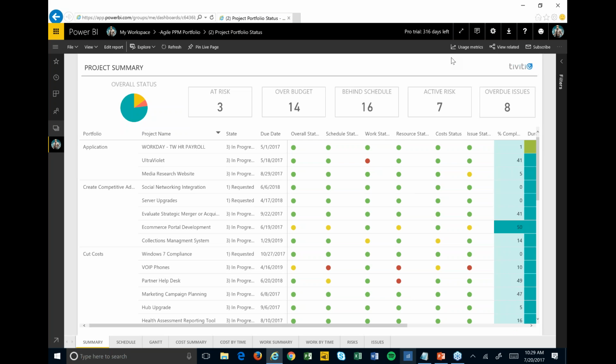They call them data alerts. So I could put an alert if any of these projects goes overall status turns red. I want to be alerted, so I don't have to come in here and necessarily even check every day what's going on. The system, Power BI, will alert me and say, hey, this project is now red, and here's a link to the report. You might want to go check that out and drill into some details if you want to.